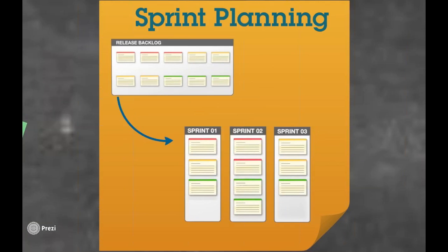So you have sprint planning meeting. Rule of thumb, for every week that you have planned for the sprints, you typically have 1 hour of sprint planning with your team. And this includes the entire Scrum team. And I'll introduce those folks in a moment. But during the sprint planning, you're trying to answer two questions. What will be done in this sprint, and how are we going to do it?